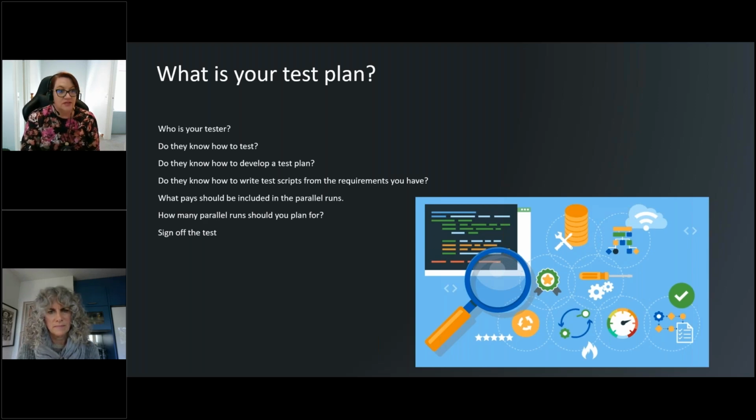We also do integration testing. So obviously, if you have any integrations as part of your project, we want to run an integration from one test system to another test system, making sure that the integration actually runs on schedule, how it's supposed to. Is the data in the correct place? Is the data actually the correct data to be there? And is the method of transfer working for that integration?